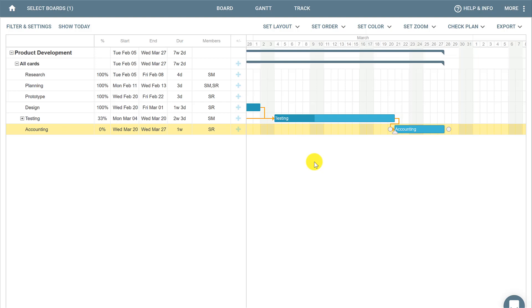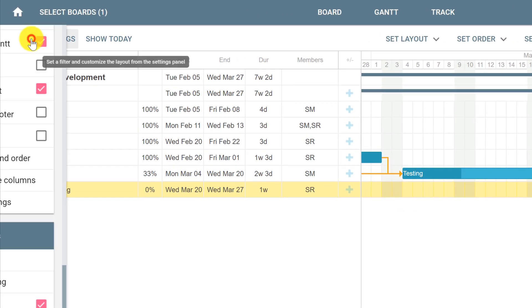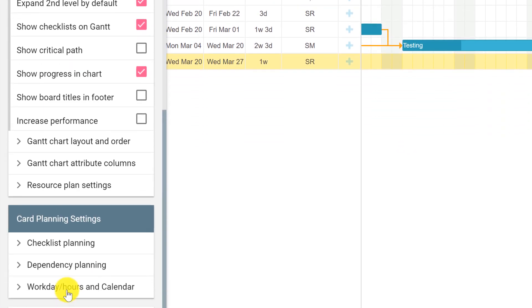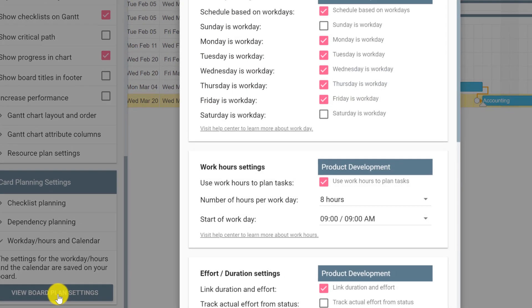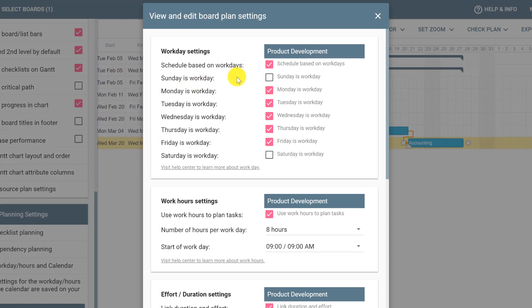If you want to customize this information to have a precise working hours detail on your cards, you can click Filter and Settings, select Work Days/Hours and Calendar, then click the button View Board Plan Settings. This pop-up will show the workday settings where you can check if Sunday and Saturday are work days or not.